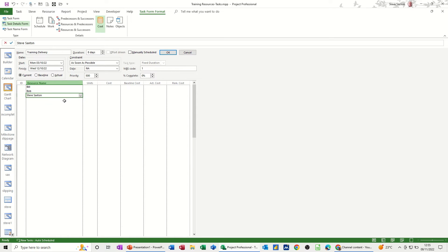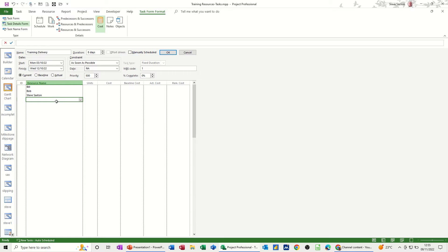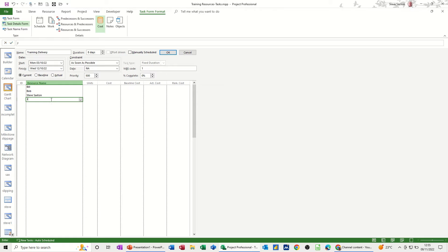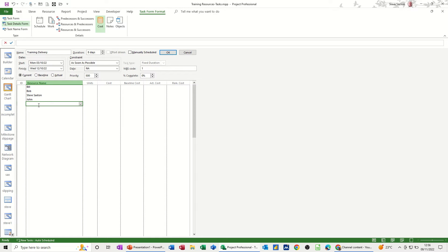Of course, you can still go and do it the normal way. I normally use the Gantt chart view and assign resources, so that's still a feature to do, but I'm just showing you that you can actually do it in the task form itself. That's where it's for. And if you create a resource, so if I put John in here, that resource, as it would in a normal Gantt chart allocation of resources, will create a resource on your resource sheet.